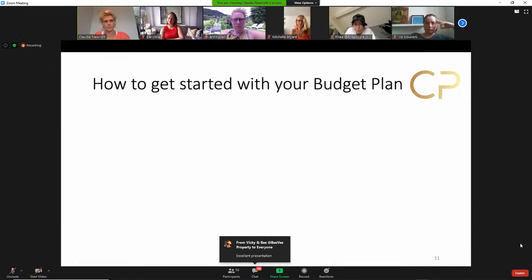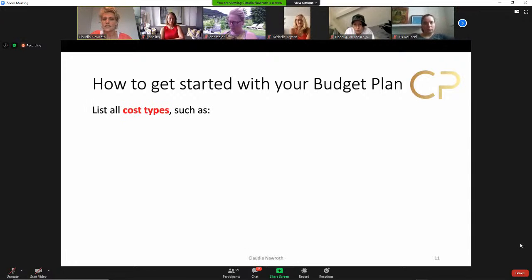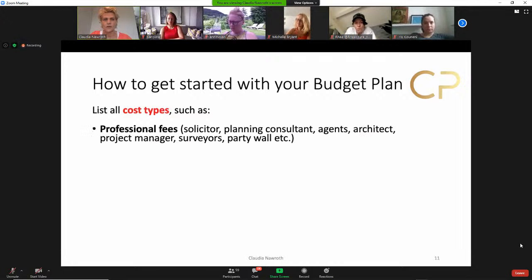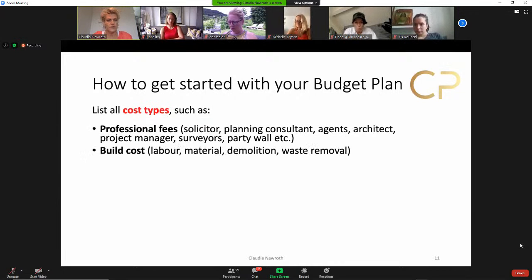So coming to the more practical things, how would one start to create a project plan? So very simple, you first look at your cost types. This is, for example, professional fees, solicitor, planning consultant, agents, architects, project managers, surveyors, party wall surveyor, and so on. So this is the professional fees. That's one type of cost. Then, of course, you have the build cost, which is split into labor, material, demolition, waste removal, all these things.